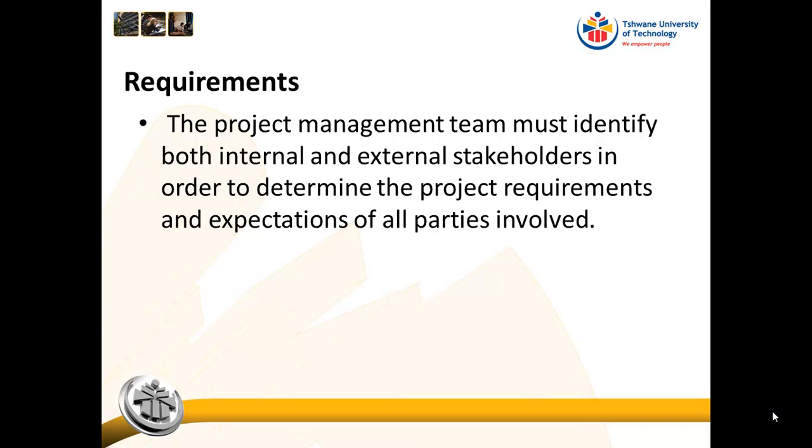Remember that a requirement is always linked to a stakeholder. And sometimes students misunderstand requirements, because for the career day stall, you might say to me, a requirement for the stall to be successful is a table. No, that's not a requirement. That is equipment that you need.